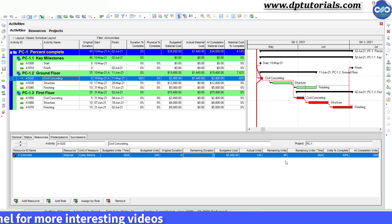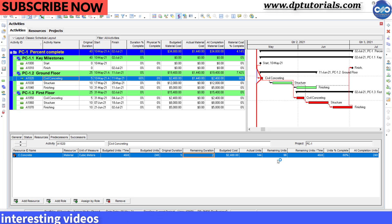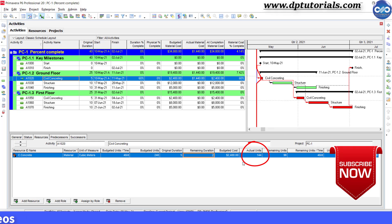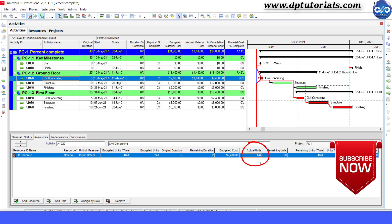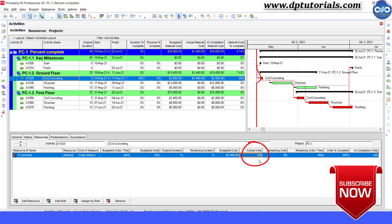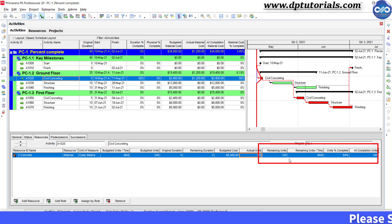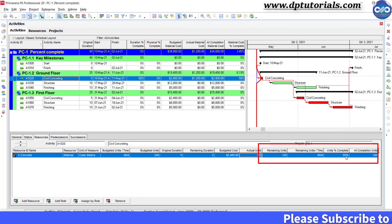But in reality, the actual units were say 120 cubic meter. So, enter the same in the actual units field and so the remaining units will become 120 automatically. And now the percentage complete gets changed to 50% right over here.